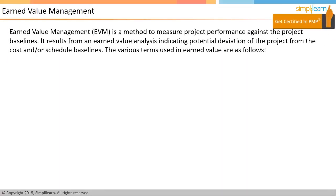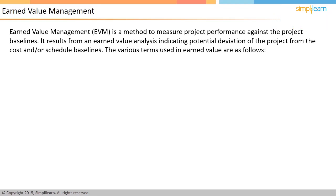Earned value technique is an excellent way to track project progress against the project plan. It is a method of measuring project performance objectively and comparing it against the project baseline. Results from an earned value analysis indicate deviation of the project from cost and schedule baselines. A baseline is the initial approved value along with approved changes.